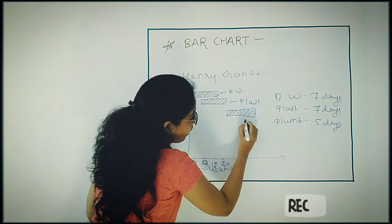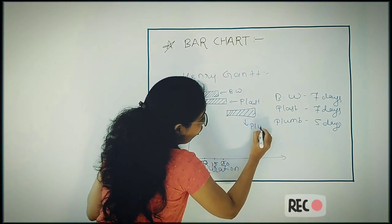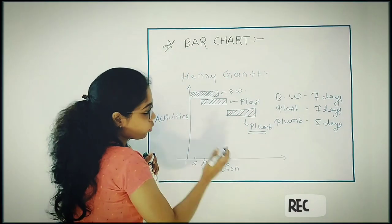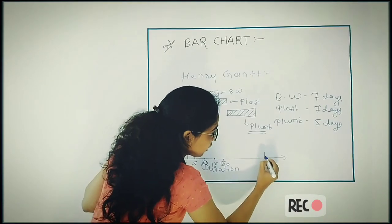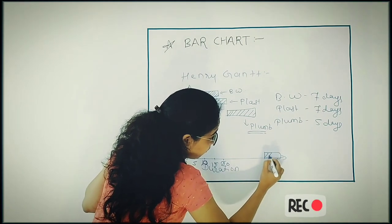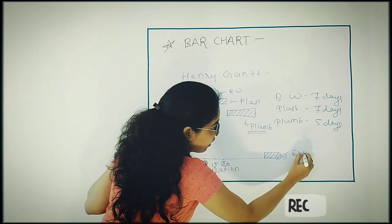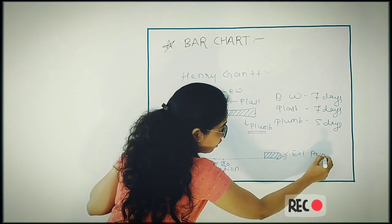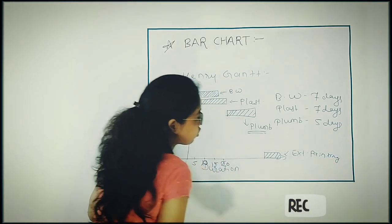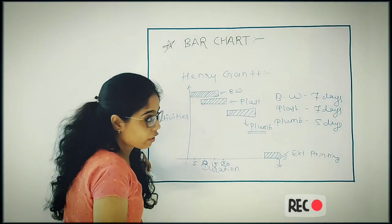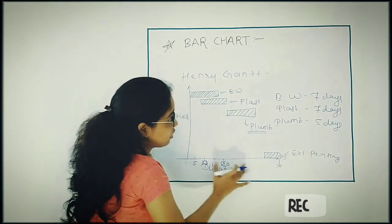In this way, you have to show all the activities into the chart. And if you suppose the last activity is your external painting, okay, this is your external painting. So here you will come to know what is the total duration required to complete all those activities.